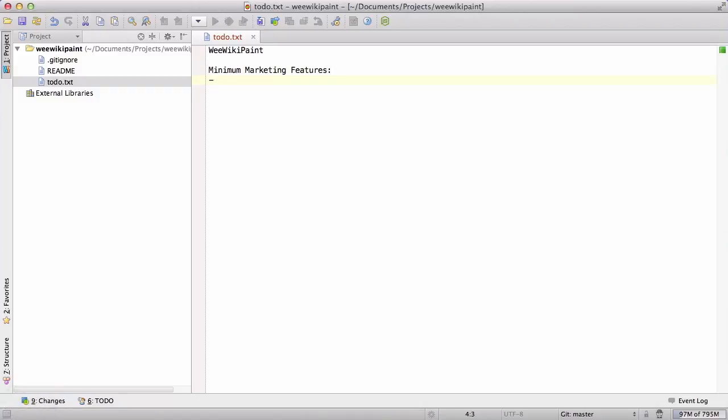We could say that our first feature is a collaborative painting wiki. But honestly, that's too much work. These episodes are only 15 minutes long, so we may not get to that right away. So we need to make it a minimum marketable feature. So I think maybe just a marketing homepage would be a good start. And then I think from there we can have a collaborative painting page, but very basic. And then we can wikify the pages. And then maybe we could have more complex painting. I'm not sure. And then maybe more collaborative features.